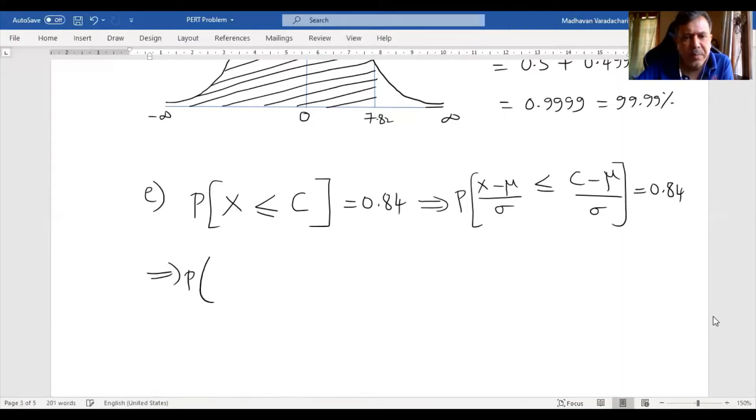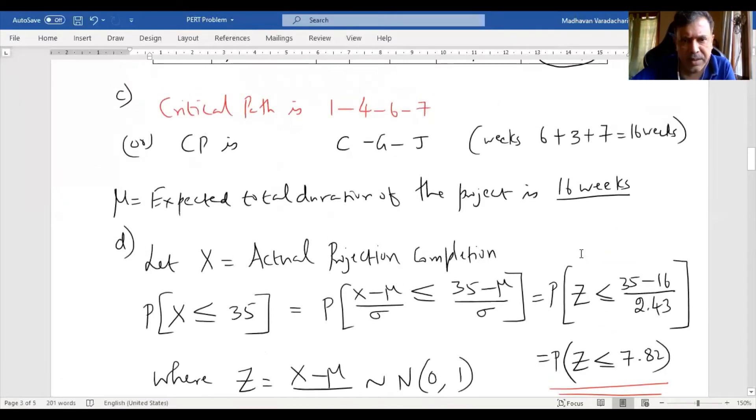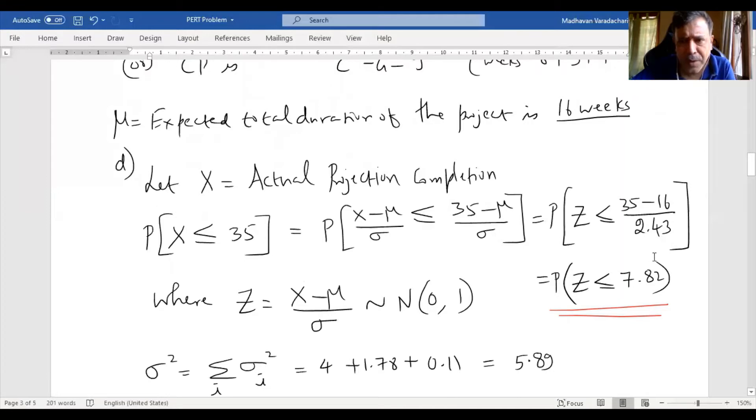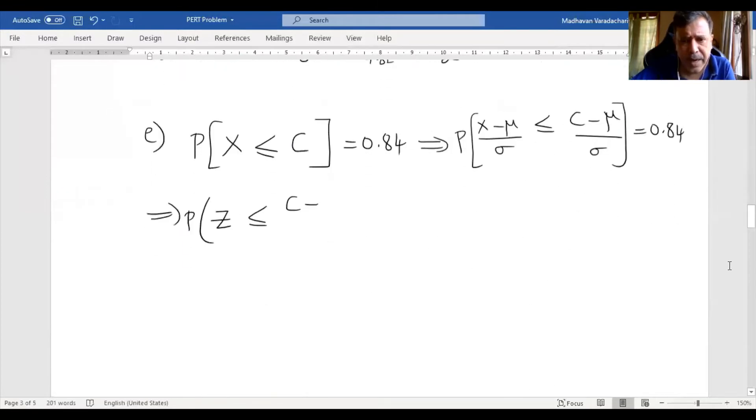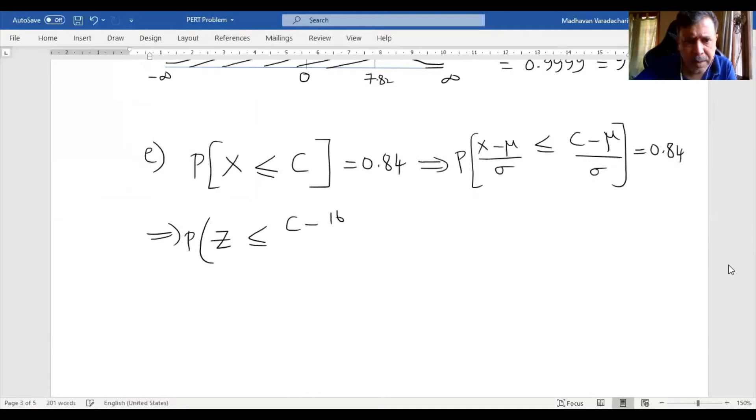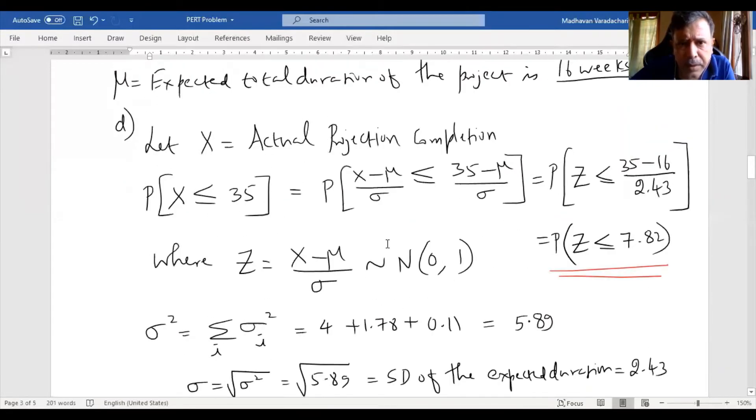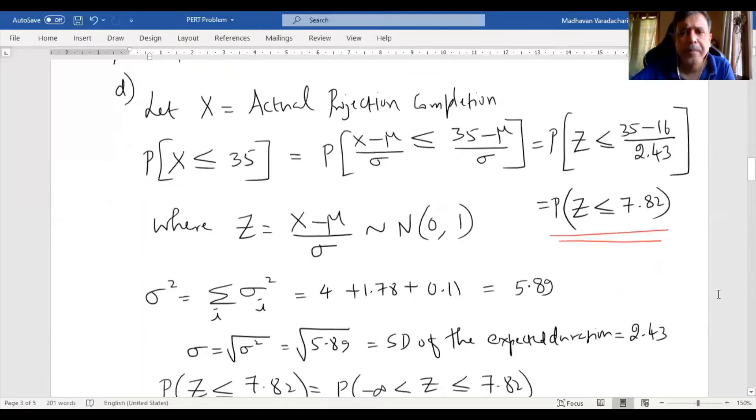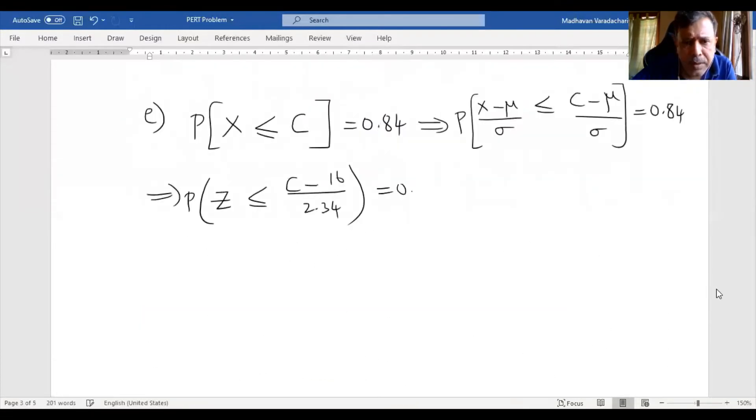Subtract both sides by μ, divide both sides by σ. This equals 0.84. We know X minus μ by σ is our z value. Let us substitute the μ value, which we found is 16 weeks, and standard deviation 2.43.